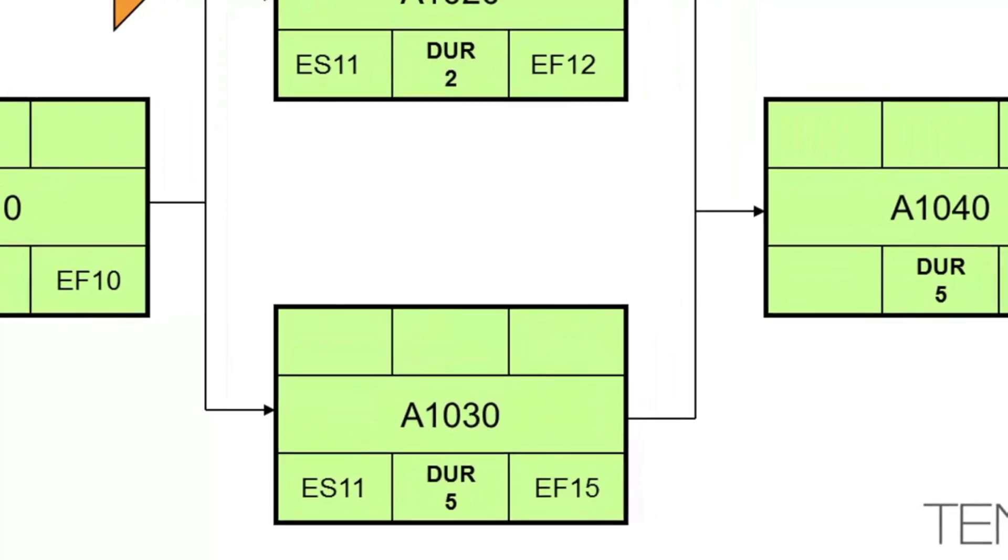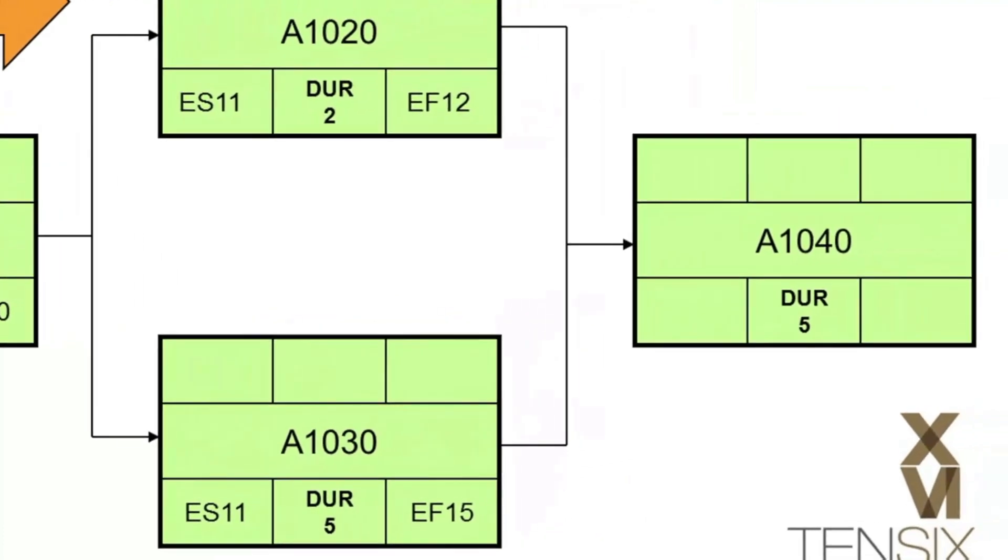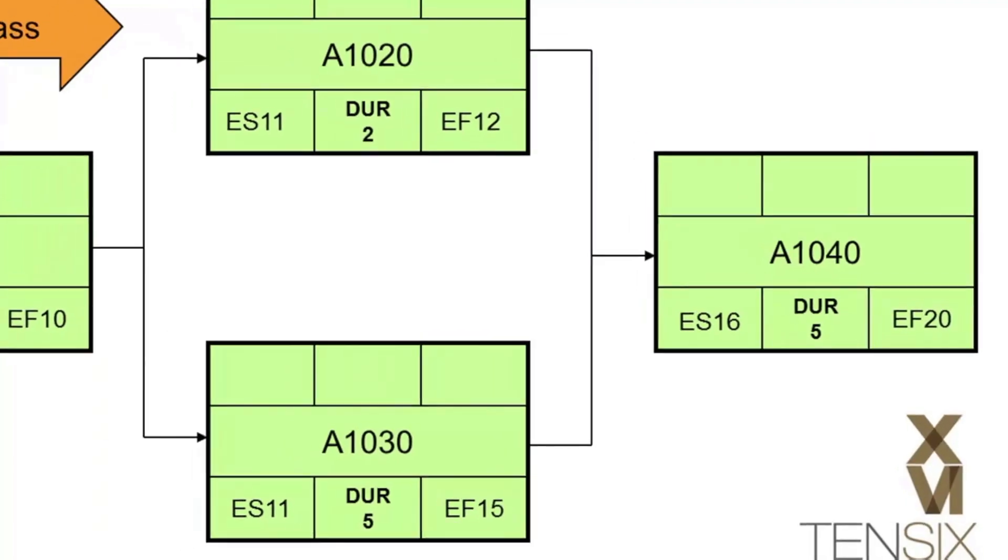Now let's look at A1040. This one is interesting, because it cannot start until both A1020 and A1030 finish. Its early start date must therefore be 16, because we always take the later date on the forward pass. The latest early finish date of its two predecessors is day 15. With activity A1040's five-day duration, it will have an early finish date of day 20.